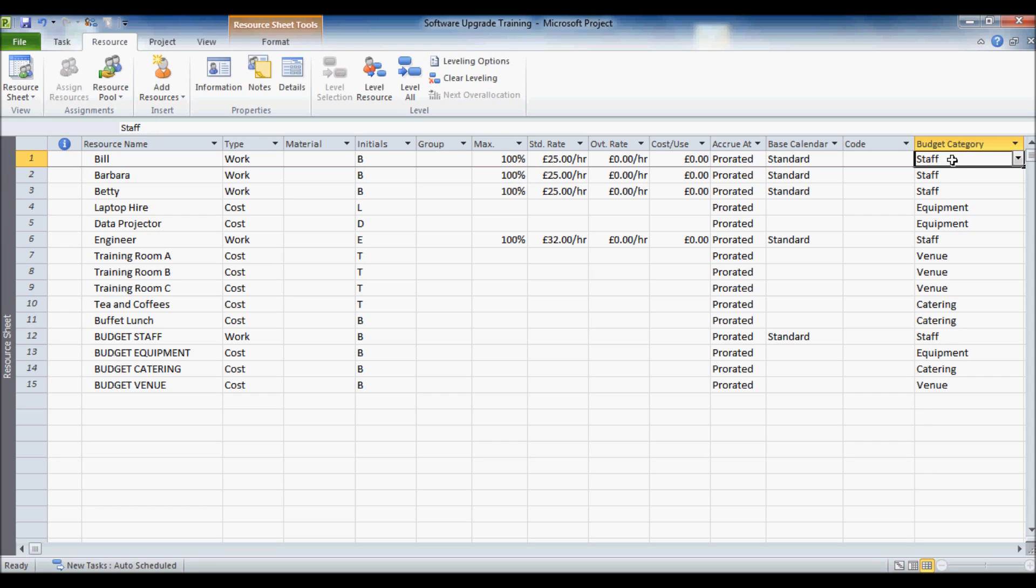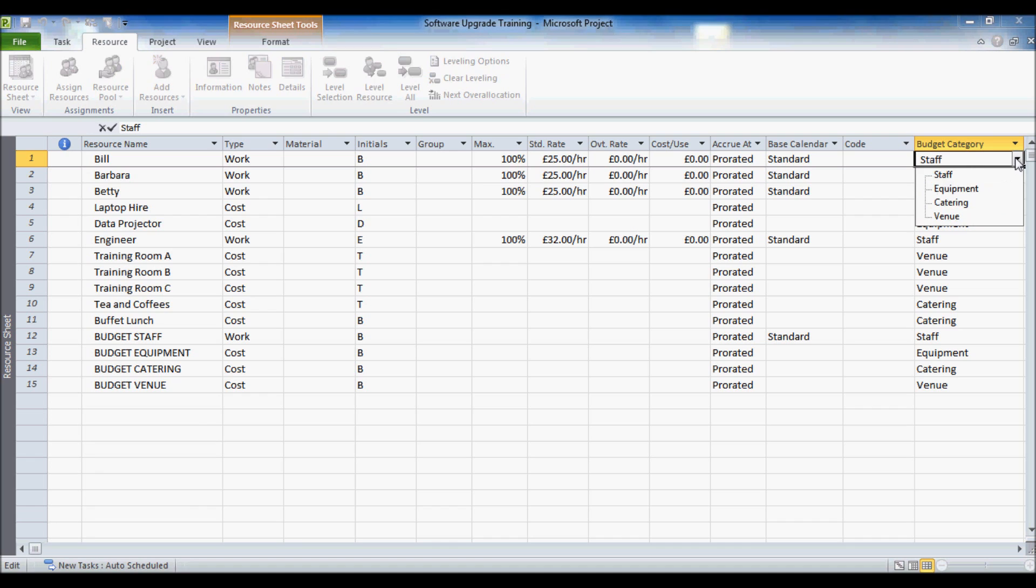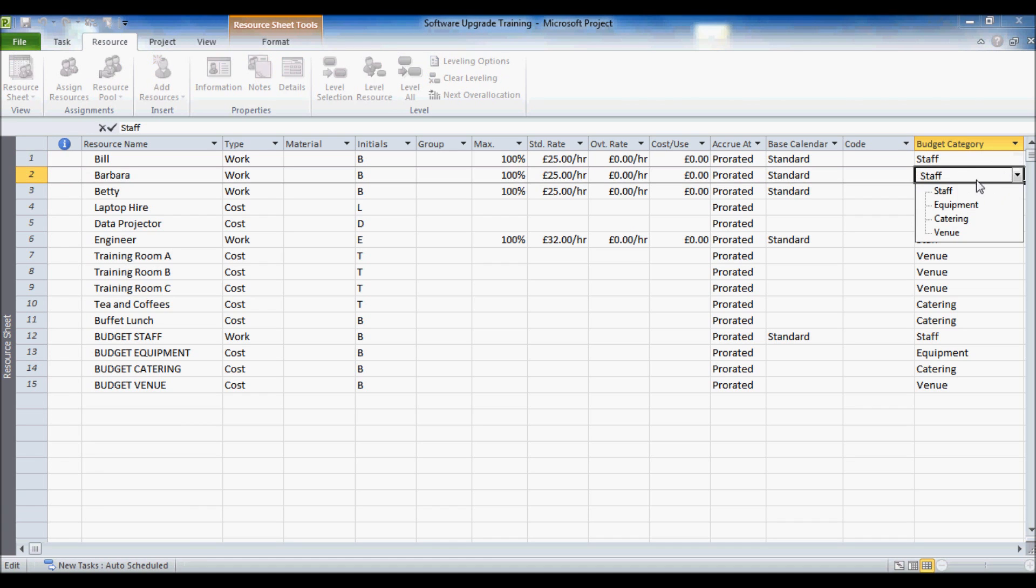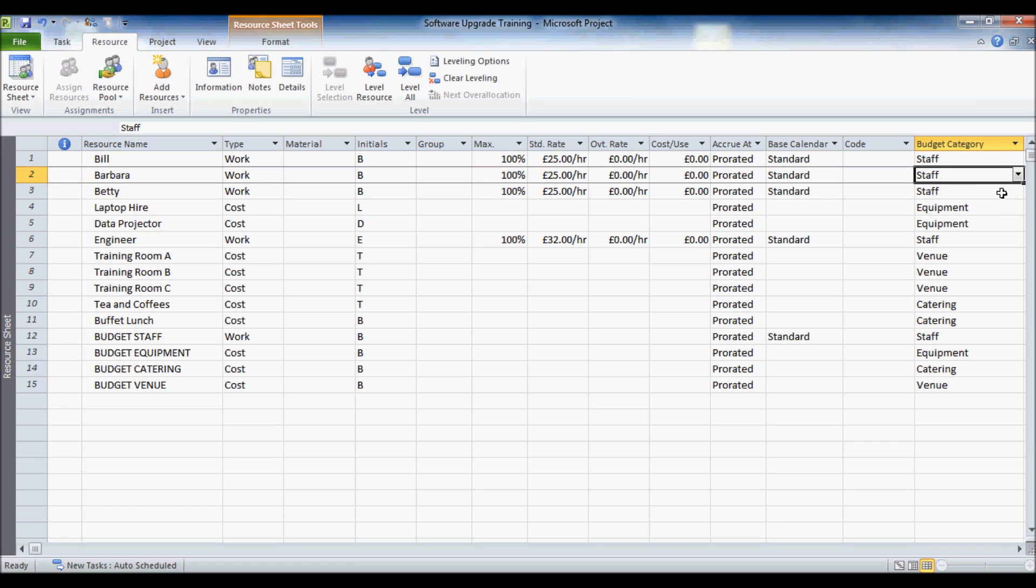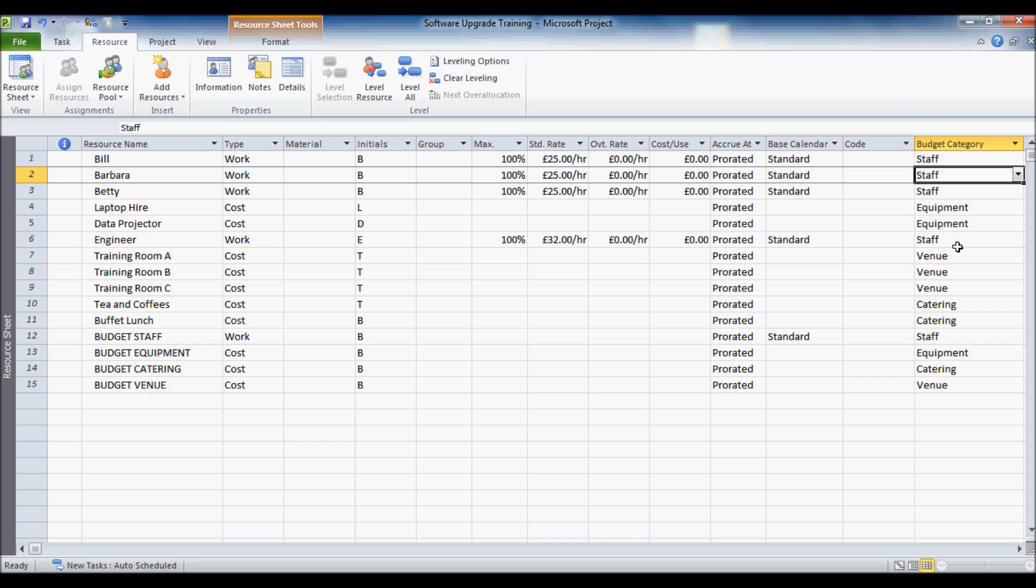And you can see that I've actually previously assigned the correct category. But you basically from that drop down list choose which category you are assigning to each of these resources. Make sure you also assign the correct resource to the correct category to your budget resources. Otherwise this whole thing will not work. It is just a matter of selecting from the drop down list.